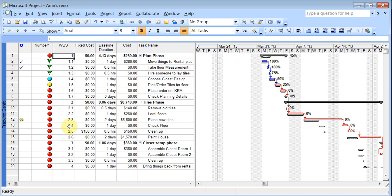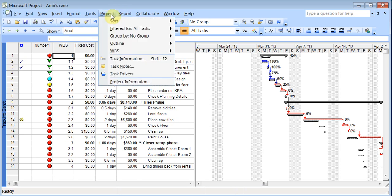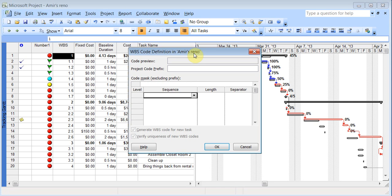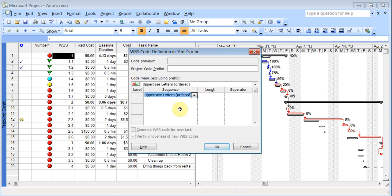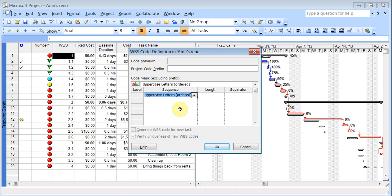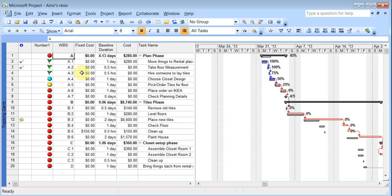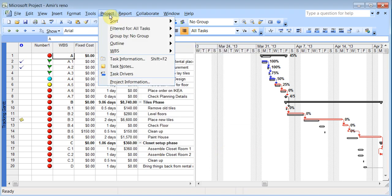And you can even change the numbering to your liking by going to, I think it's under project. And then WBS, and you can define it to what you want it to be. You can set it up to be uppercase ordered letters. Now it's gone to A1, A2, A3.